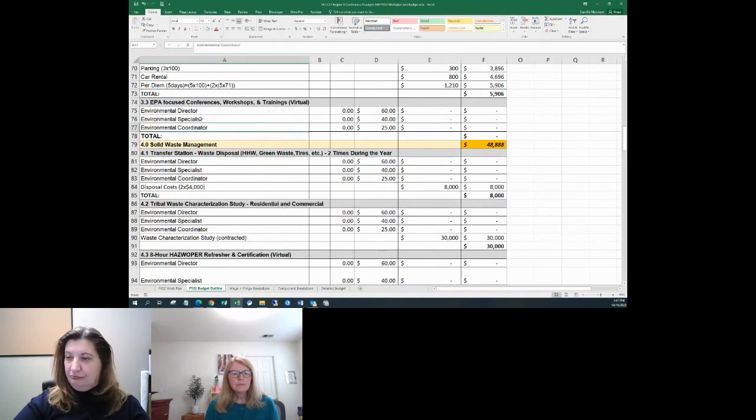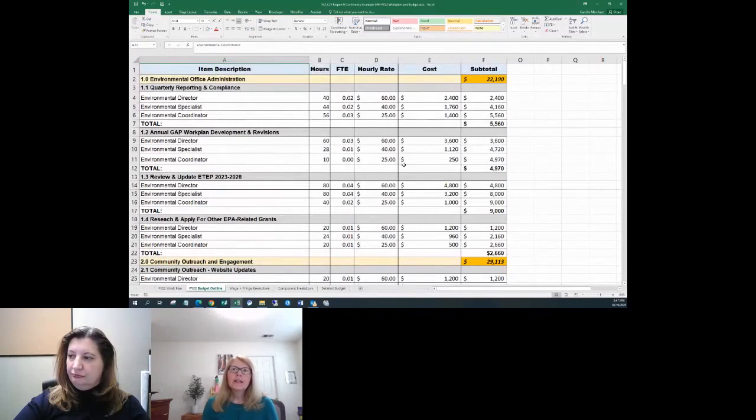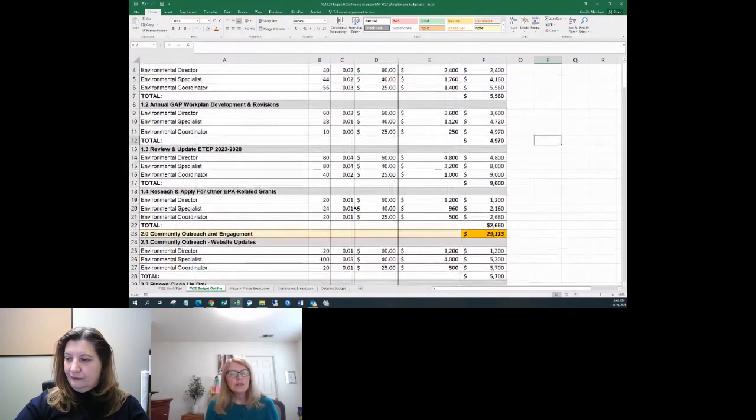I would think also sometimes you're doing your budget so far ahead. Like, of course, right now we're going to be asking for your FY23 in January. And lots of times hourly wages change every year. Yeah. So you're budgeting without knowing what salaries are going to be next year. So this would be really good to use now to submit your application, but really look at it once the year is starting to make sure the numbers are accurate.